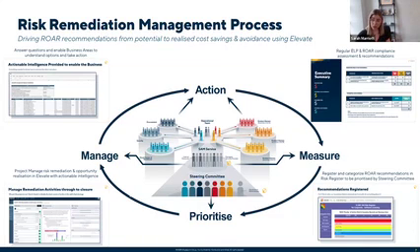So essentially what this means is that the risk owner, once it's been assigned in line with that RACI and aligned across the board, is then obligated to take that action. And if that's to remediate, or if they choose to accept the risk, they can accept it and register it in the GRC. That's completely up to them.